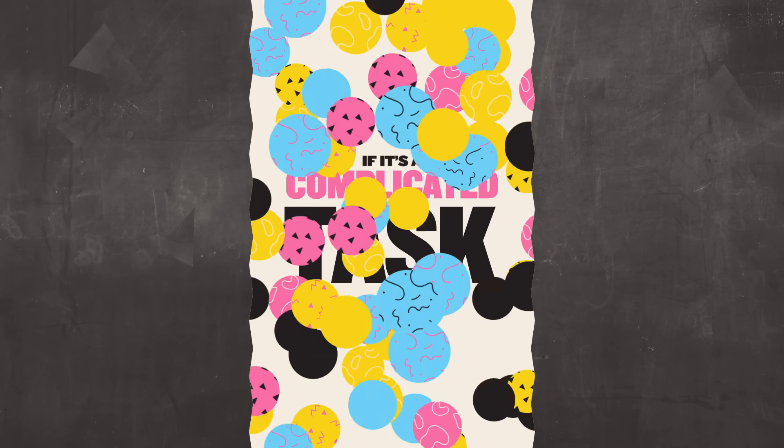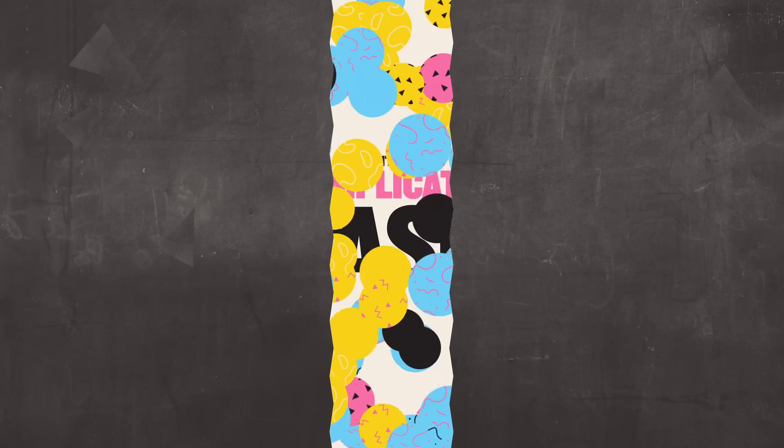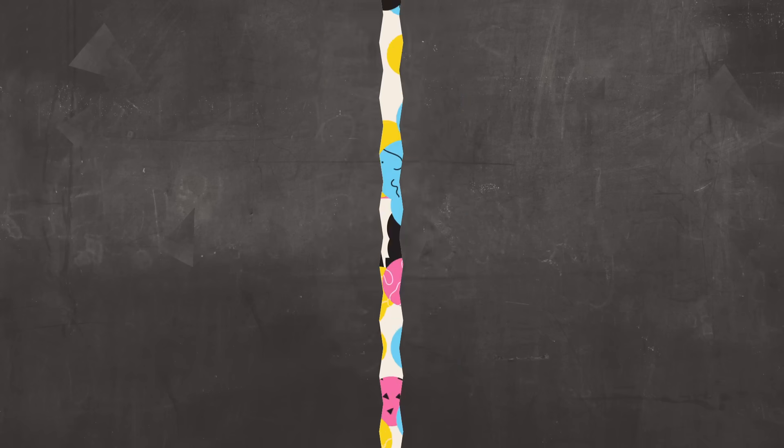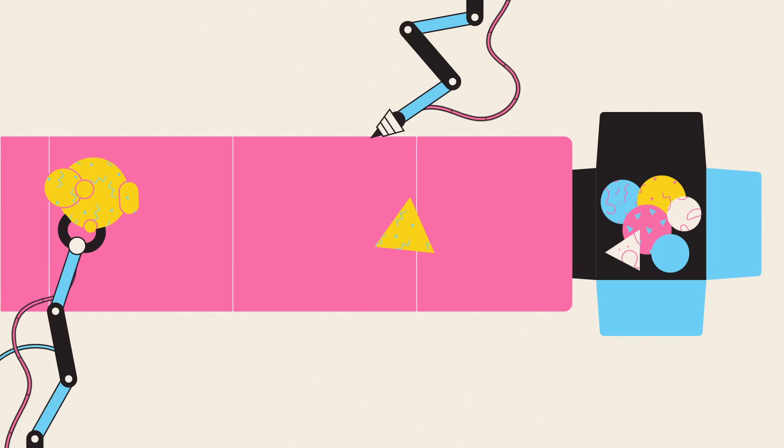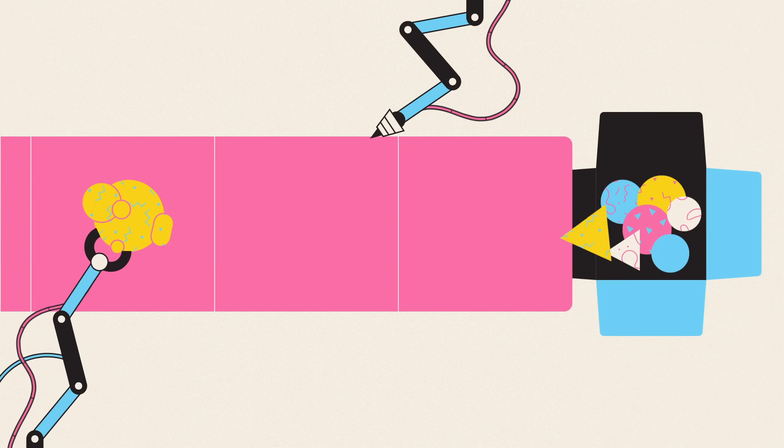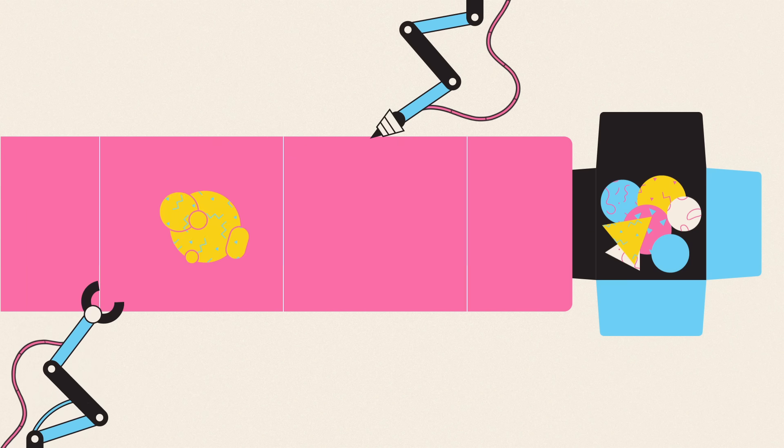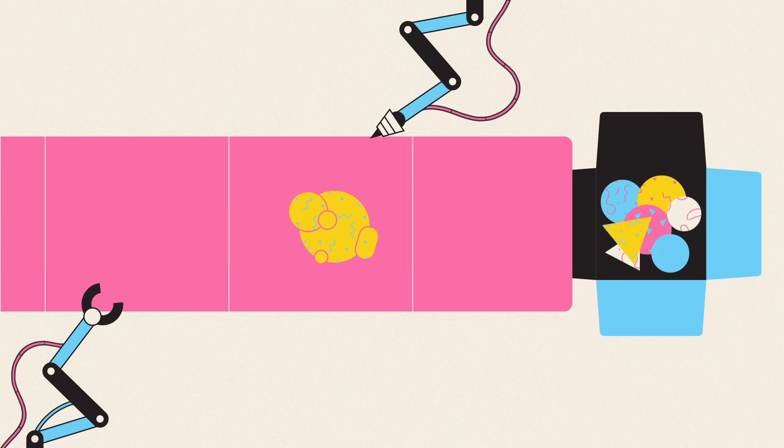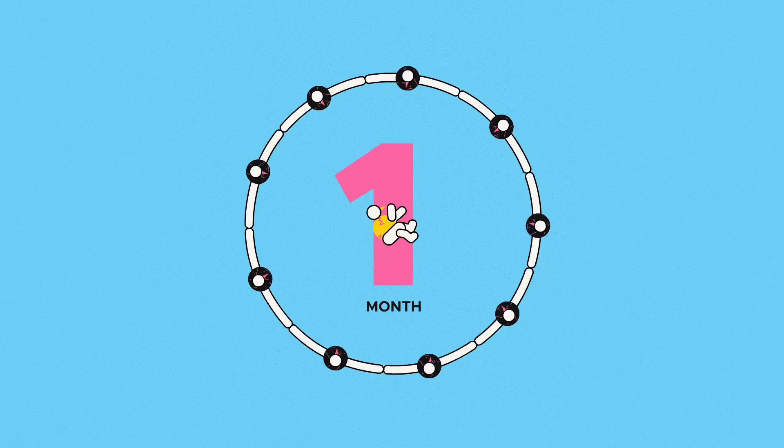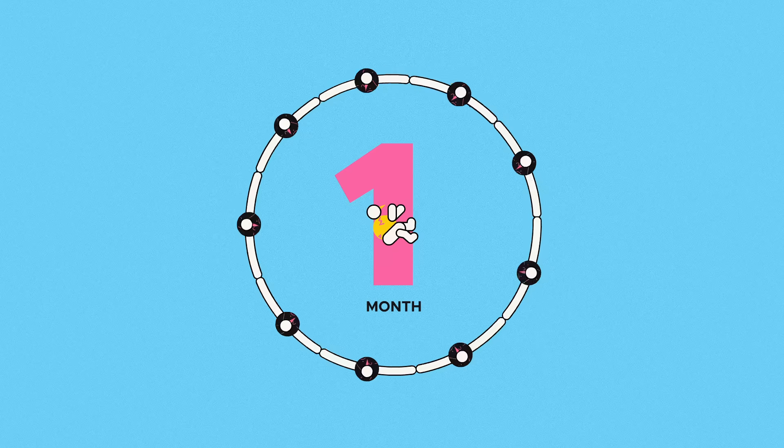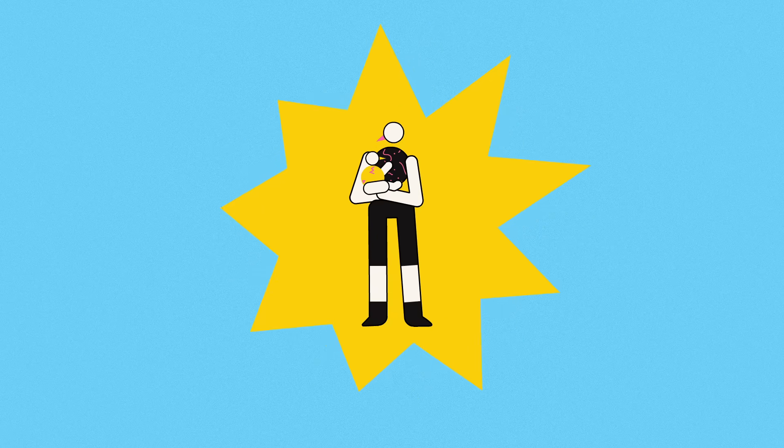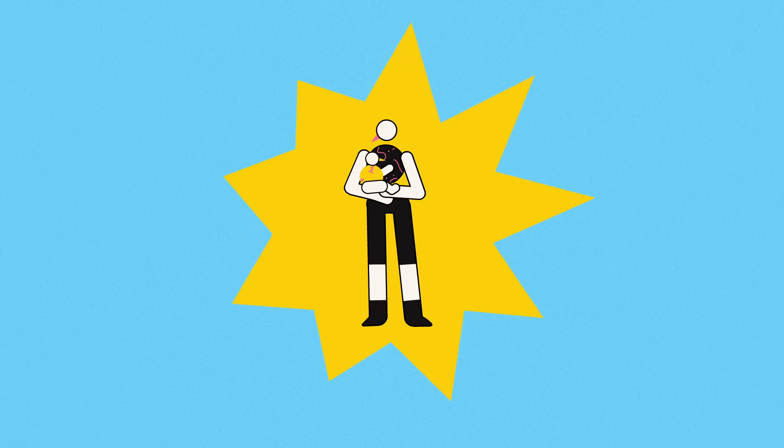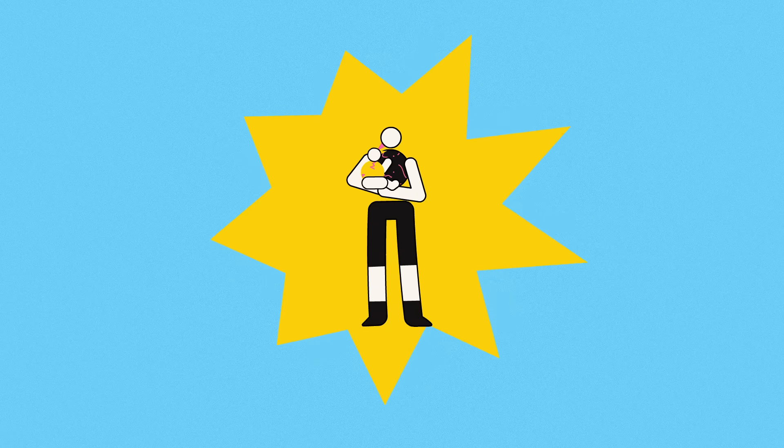Because every team member added brings new complications. The first of these is, as Brooks calls it, partitioning of work. Some tasks just don't divide up, and some simply need more time to be done properly. Nine women can't have a baby in one month. There's no dividing that workload. It's going to take as long as it takes.